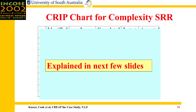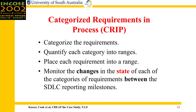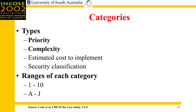Before I present the CRIP chart for complexity at the SRR, I'll explain how CRIP charts work. The CRIP process is basically as follows: one needs to categorize all the requirements for a system, then quantify each category into ranges, place each requirement in each category in a range, and then monitor the changes in the state of each of the categories of requirements between reporting milestones. Requirements may be categorized by priority, complexity, estimated cost to implement, and security classification. Categorizing requirements like this provides a check as to whether the requirement is really useful or not.